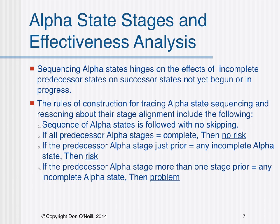The baseline alpha state stages used in the sequencing of alpha states by stage represent a risk-adverse baseline of expectation. A project wishing to make an explicit decision to depart from the baseline may choose to do so by constructing an ad hoc project baseline of alpha states, alpha state stages, and sequences. This departure from the preferred baseline is risk by design and may possess additional built-in risk. In any event, the basic rules of construction governing risk by performance still apply.